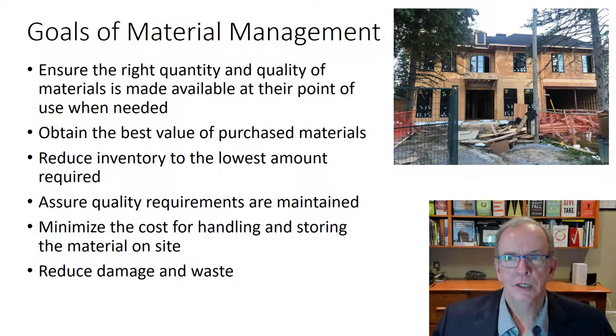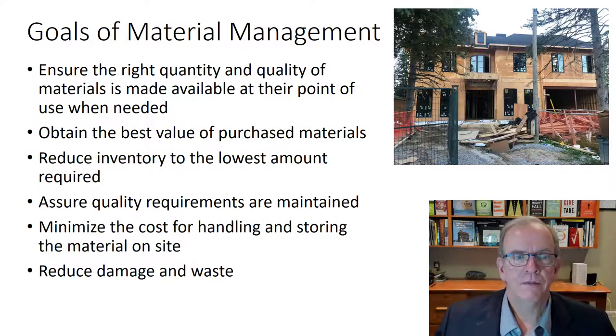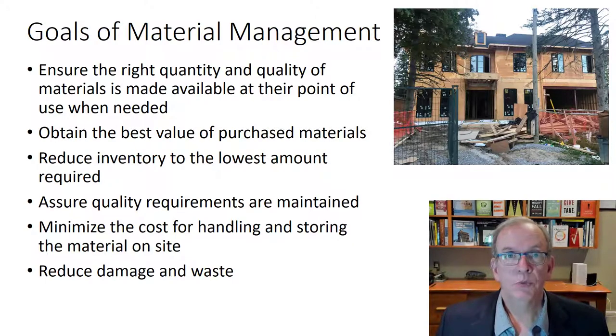But just quickly, as an example, if it's there too soon, then it's in your way. Then it gets damaged. Then you're paying for it way in advance. Then it gets stolen. Just as a few examples there. But there's a lot of things to think about. So we also want to make sure that we have gotten the best price or reasonable price given the amount of time that we take to look for it, right?